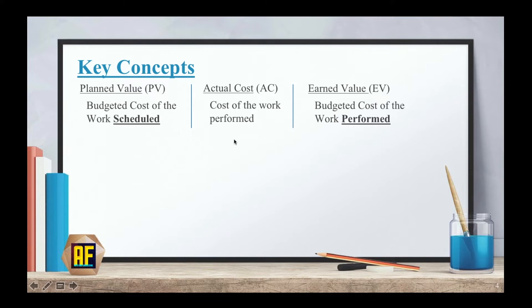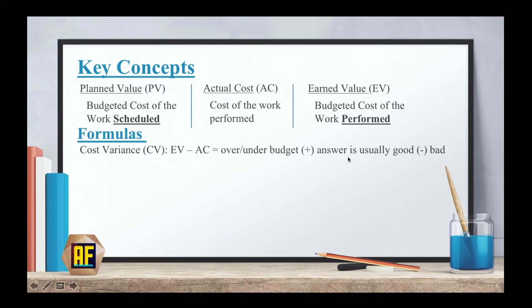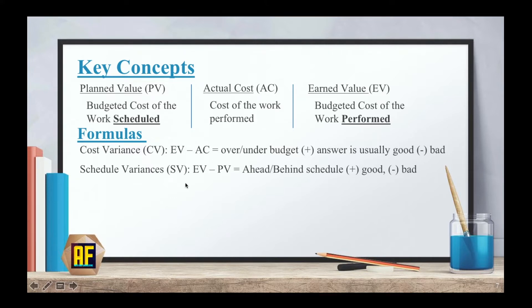So it's not just what you planned versus what it actually costs. Let's go over some formulas. The cost variance, which is the earned value minus the actual cost, will tell me if I'm over or under budget. Usually a positive answer is good and a negative answer is bad. My schedule variance, which is the earned value minus the planned value, will let me know if I'm ahead or behind schedule — again, plus is good, minus is bad.